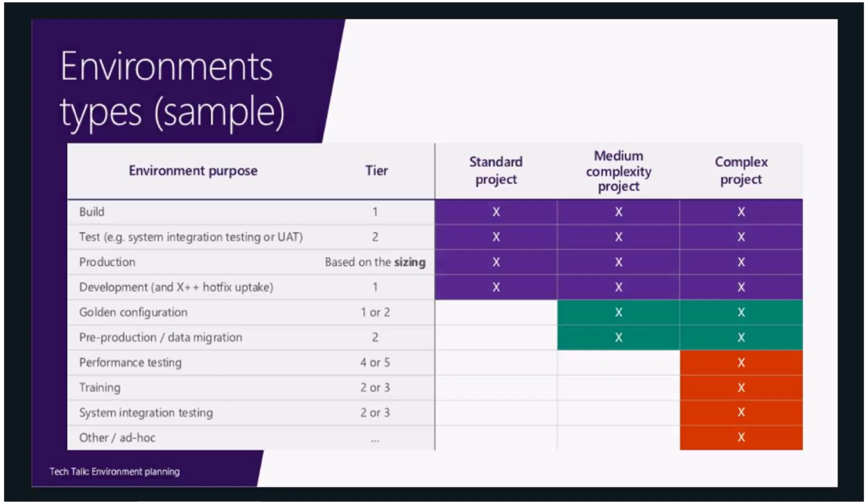In those medium complexity projects and also higher, we see that data migration is taking a larger part because there are many different legacy systems. So in order to avoid conflicting activities, you're doing UAT and at the same time there is some data migration corrupting the data in the environment and making the results of your tests incorrect.